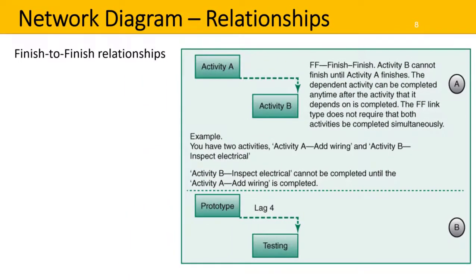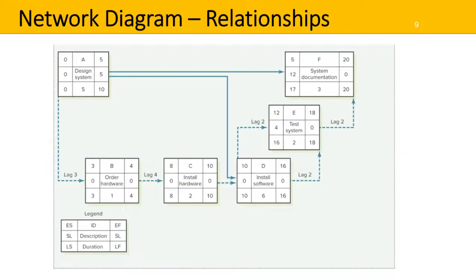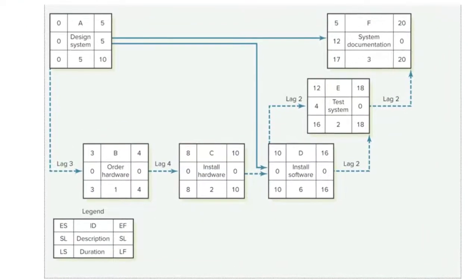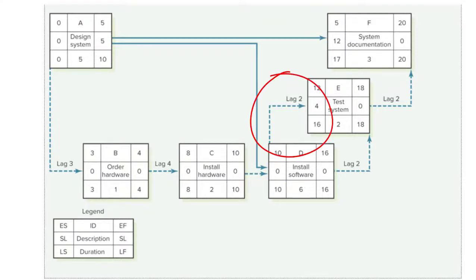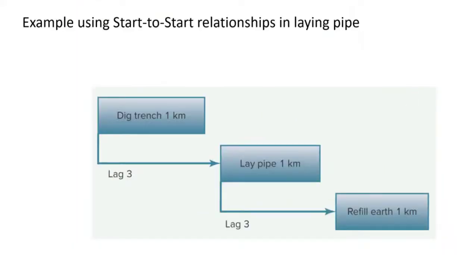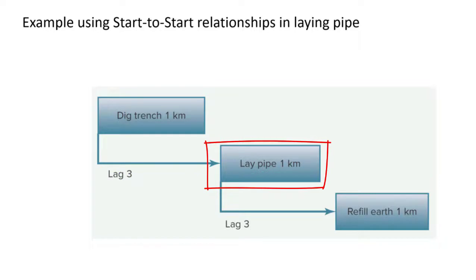Here it is in a network diagram. We can follow the dotted lines that indicate different lags. For example, there is a start-to-start lag of three days between activity A and B. When activity B is completed, there is a finish-to-start delay of four days. Between activity D and activity E, we have a start-to-start lag and also a finish-to-finish lag. Activity E and F have a finish-to-finish lag. Here is an example using start-to-start relationships in laying a pipe: first we dig the trench, there is a three-day lag before we can start laying the pipe, and then another three-day lag before we can refill the earth.